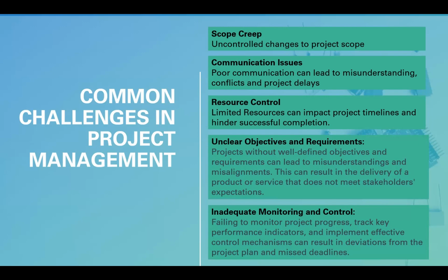As the project keeps progressing, some other things start coming up. Let us add this to the project. Let us add this to the project. And you as a project manager, if you allow those things to be added, the implication is that the cost will increase, the time of delivery will be extended, and that is a sign of failure already.